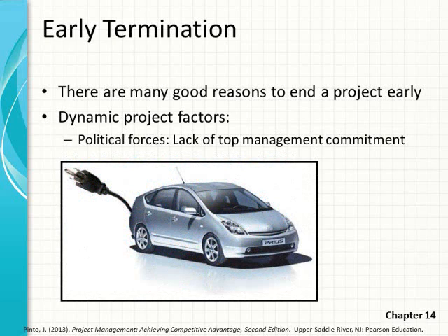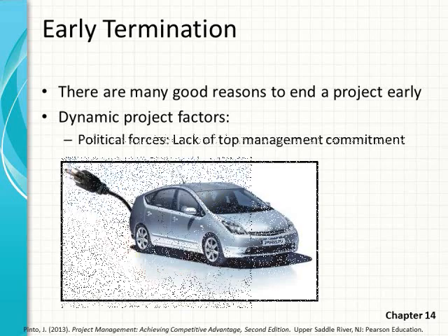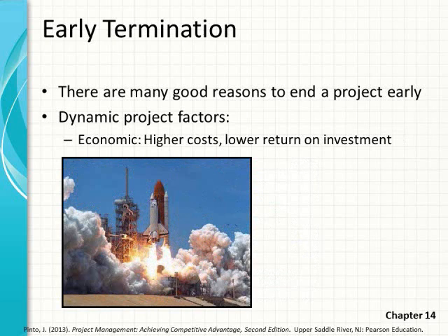Another factor are political forces. Maybe it lacks top management commitment. And we saw this earlier in the 2000s when it came to electric cars. Projects can end early because of economic factors. Higher costs are encountered, or there are lower returns on the investment. And I think that's eventually what led to the end of the Space Shuttle program.